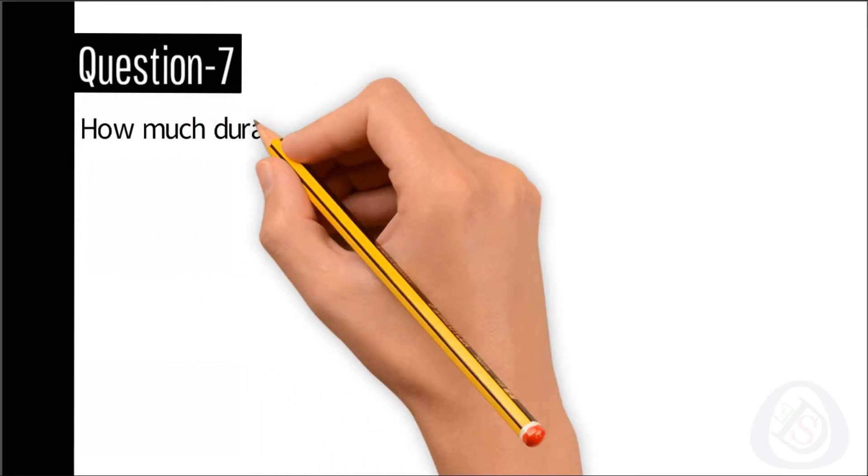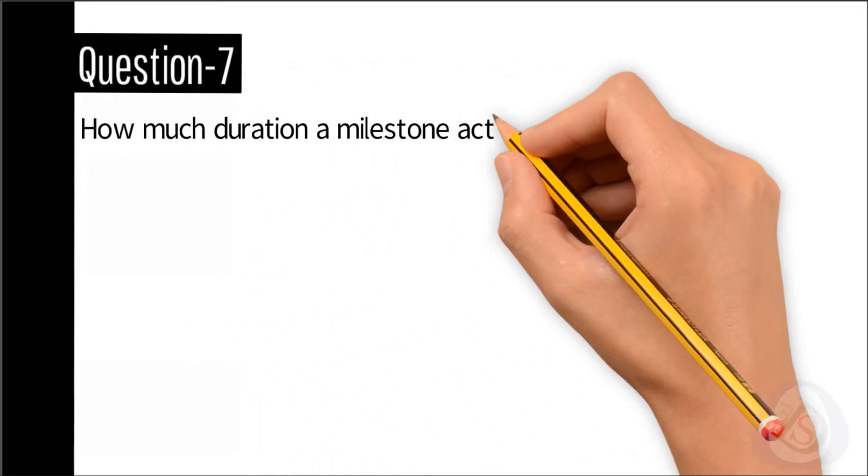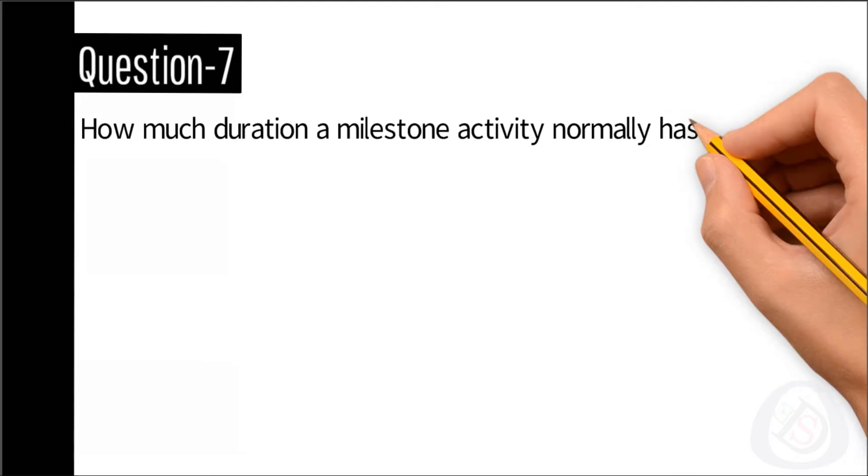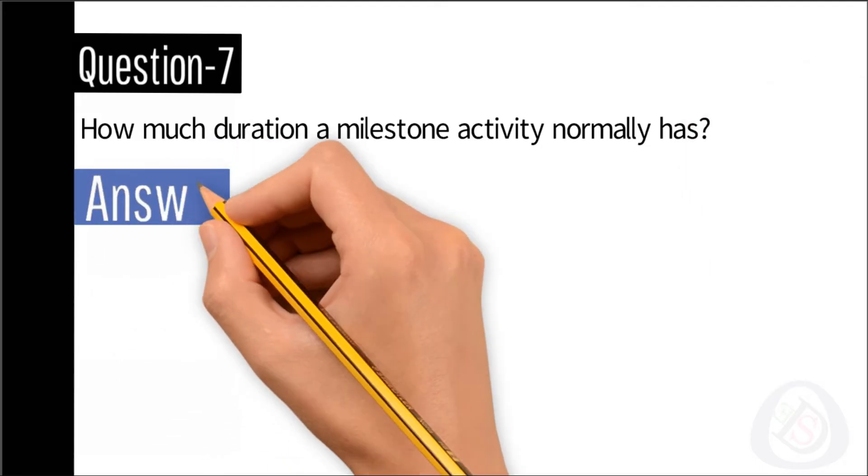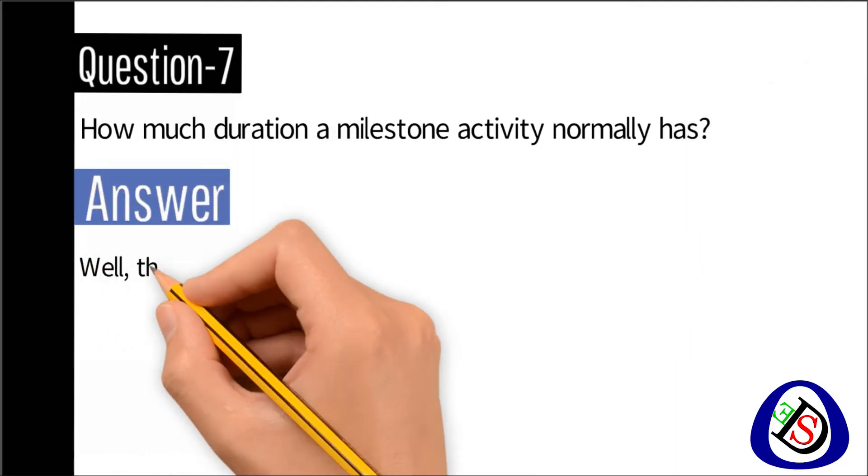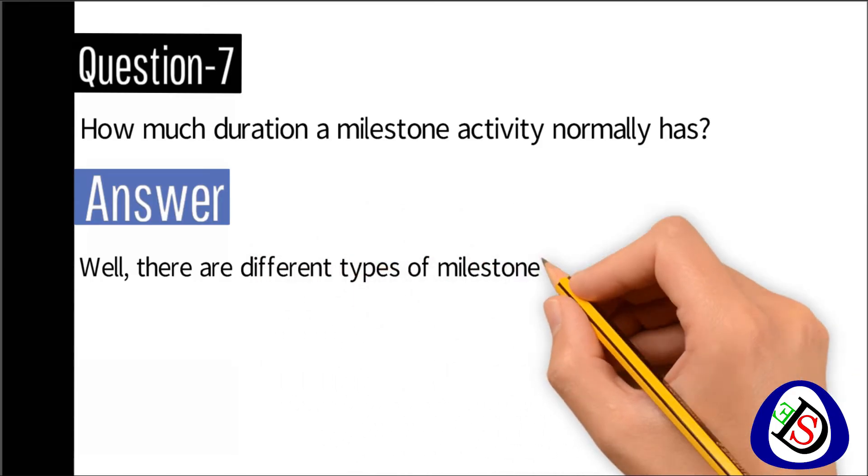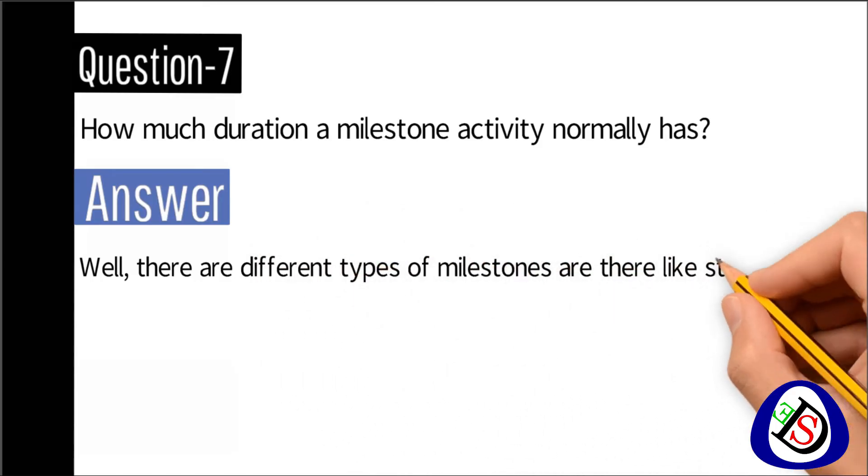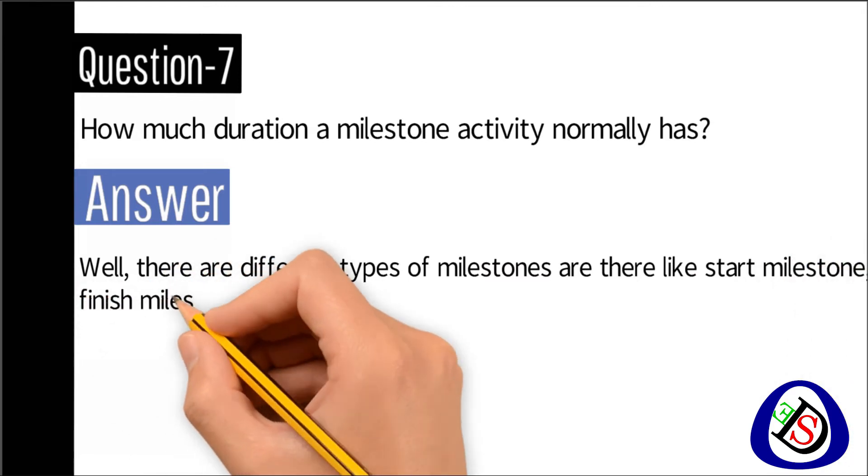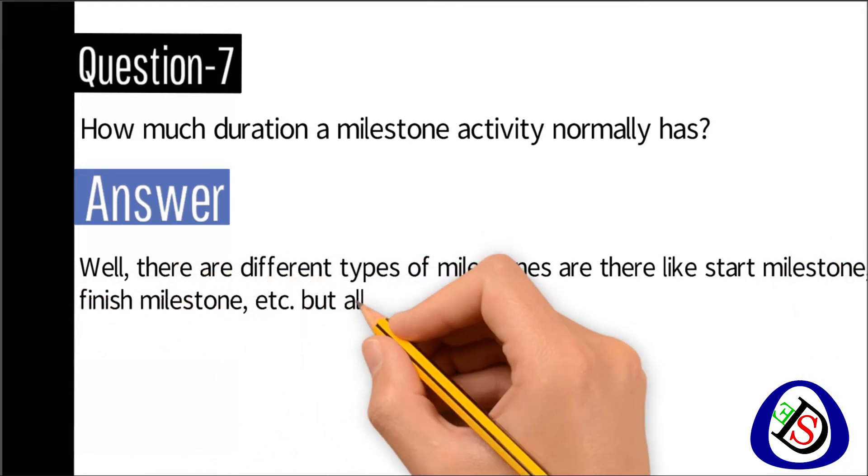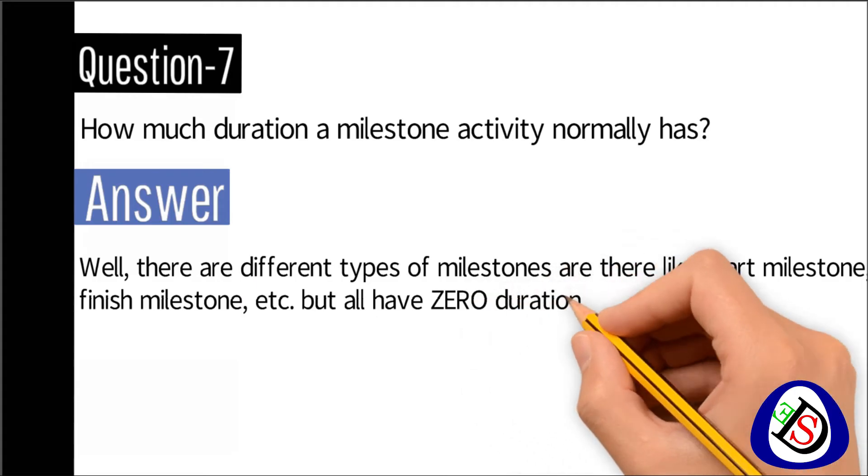Question number seven: How much duration does a milestone activity normally have? Answer: Well, there are different types of milestones like start milestone or finish milestone, etc., but all have zero duration.